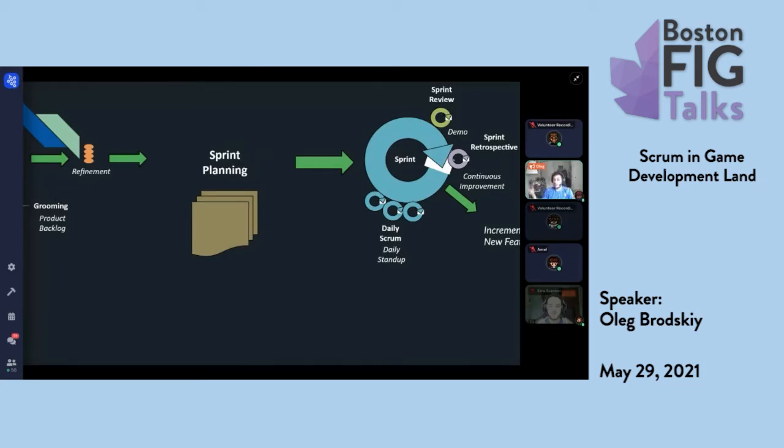and so when the team is done with planning the sprint, that's what it is. Now, importantly, this is the team making a promise that they are going to deliver the work that they have taken in over the course of the sprint. So by the end of the sprint, all of that work should be presentable to the product owner in whatever fashion has been agreed upon based on refinement.